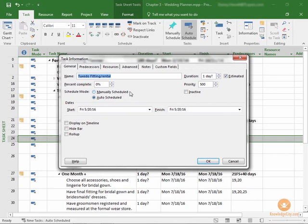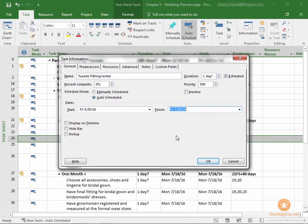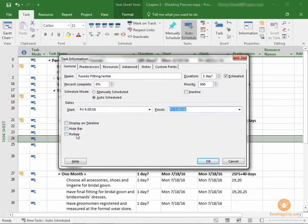Is this task auto-scheduled, or is it manually scheduled? We discussed that earlier. Is it inactive, which we also discussed? There are your start dates and your finish date, which can be adjusted here if you want to manually schedule. If you set a start and a finish, you will be manually scheduling this. You can choose whether or not this task displays on the timeline. Not all tasks are displayed on the timeline, just those you select to show. We can hide the bar or roll it up if we choose to do that. This is just the general tab of the Task Information window.